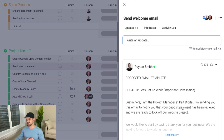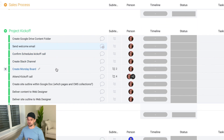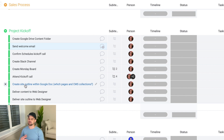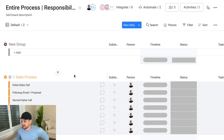Then we get into the project kickoff where my project manager steps in. He creates a Google Drive, sends the welcome email — the template is tagged right in the comments so he can copy and paste it — schedules a kickoff call, creates a Slack channel, duplicates the monday board template, attends the kickoff call, creates the site outline in a doc, and delivers both the content and site outline to the web designer.